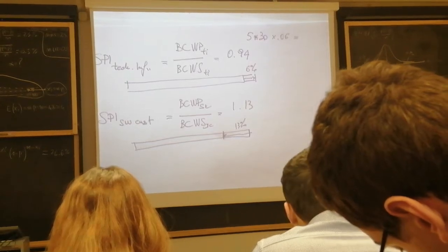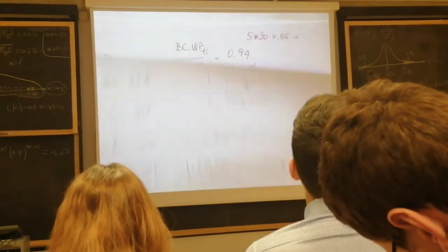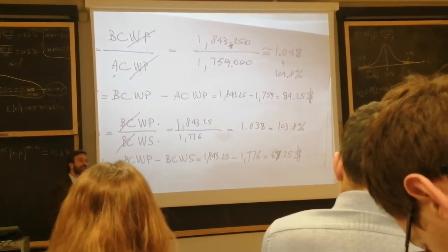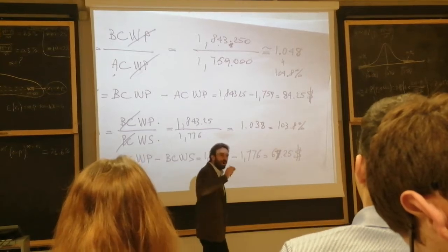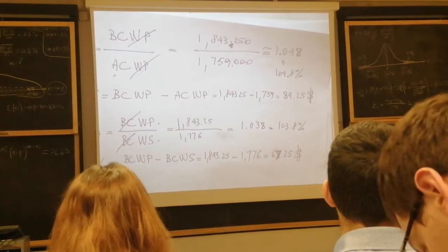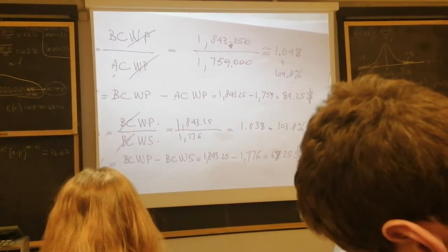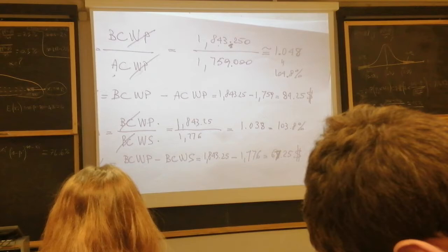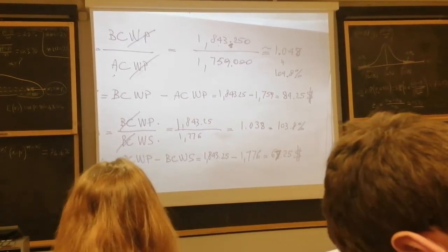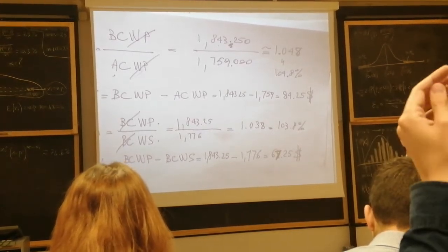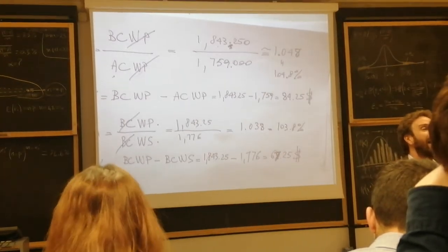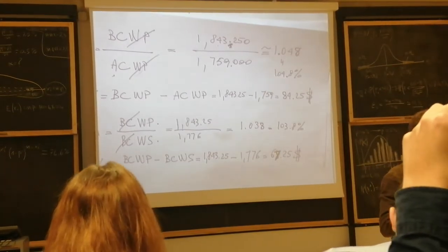So the lesson learned here is that when it comes to cost, you may not care about what is earned and what is lost in each task, because dollars are dollars, and you just consider it at the top level of the project. But when it comes to time, you need to look into the schedule and understand the sequence of the array, because only critical tasks impact it.